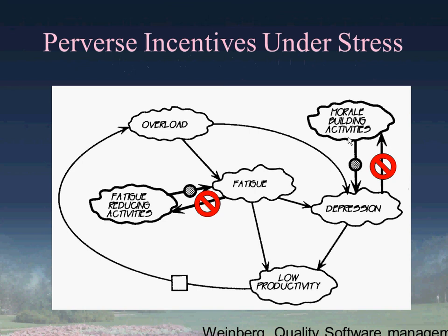What are you cutting out of this system? You're cutting out the balancing feedbacks. And that's not the way to bring a system back into line. It leads it to be even more unstable, even more divergent. It leads the reinforcing feedbacks, the vicious cycles involved here with overload, low productivity, fatigue, those are just much worsened. You've cut out the things which allow it to have some modicum of chance of sticking together. And that's when all hell tends to break loose.